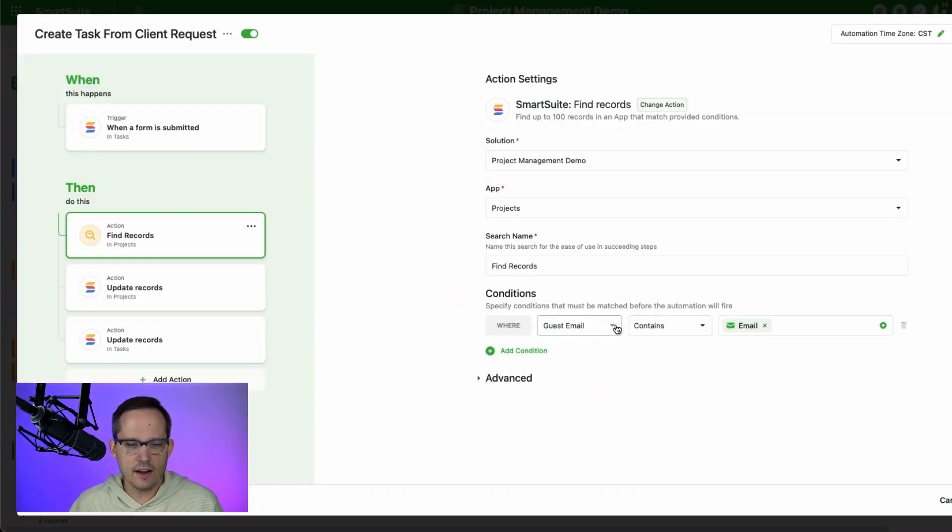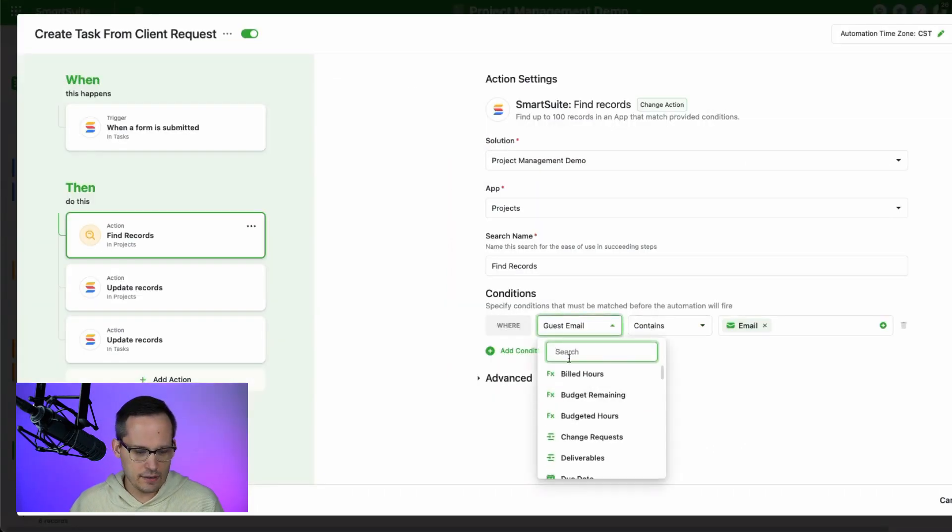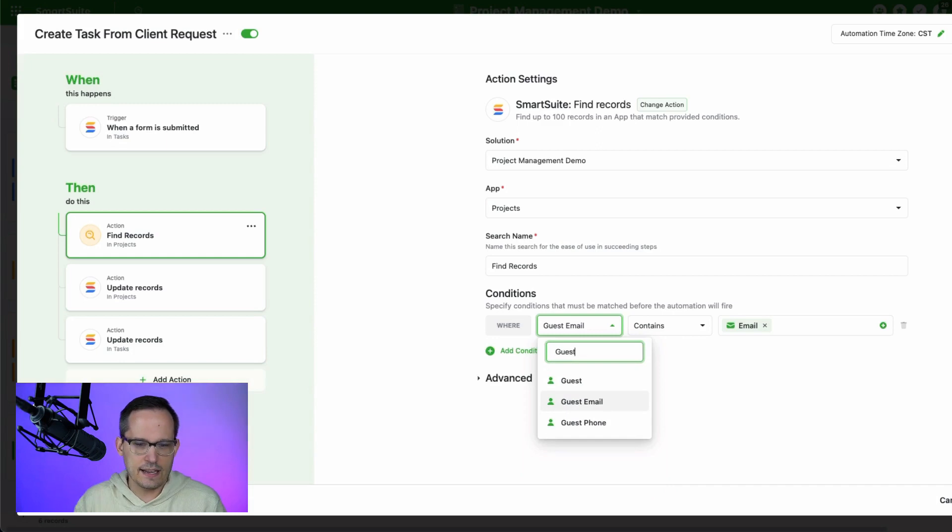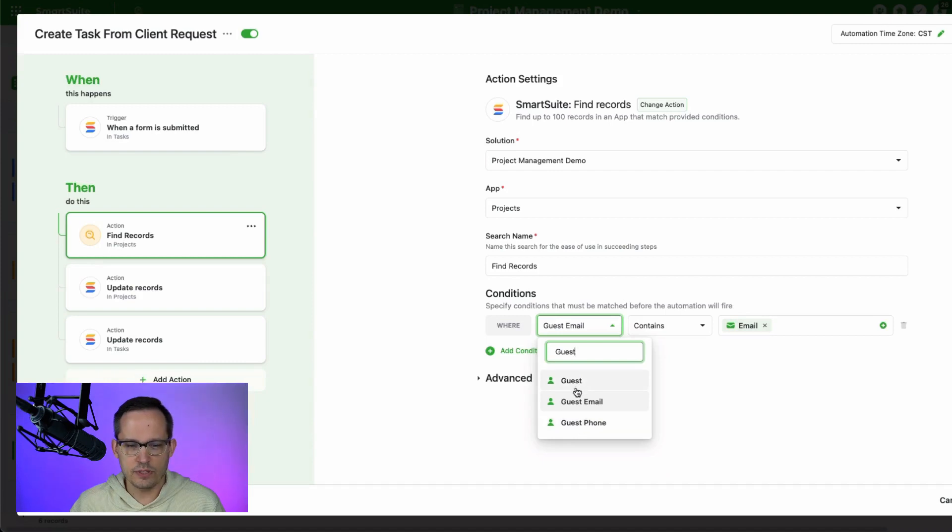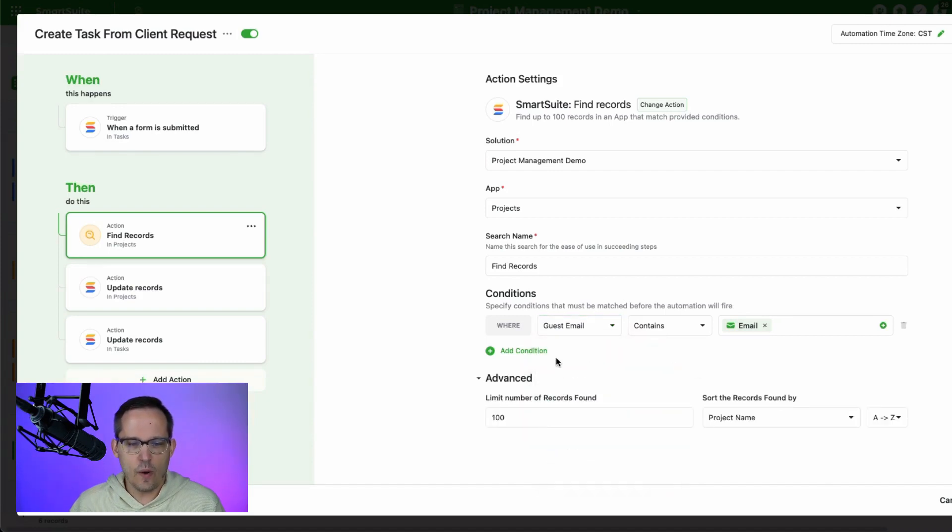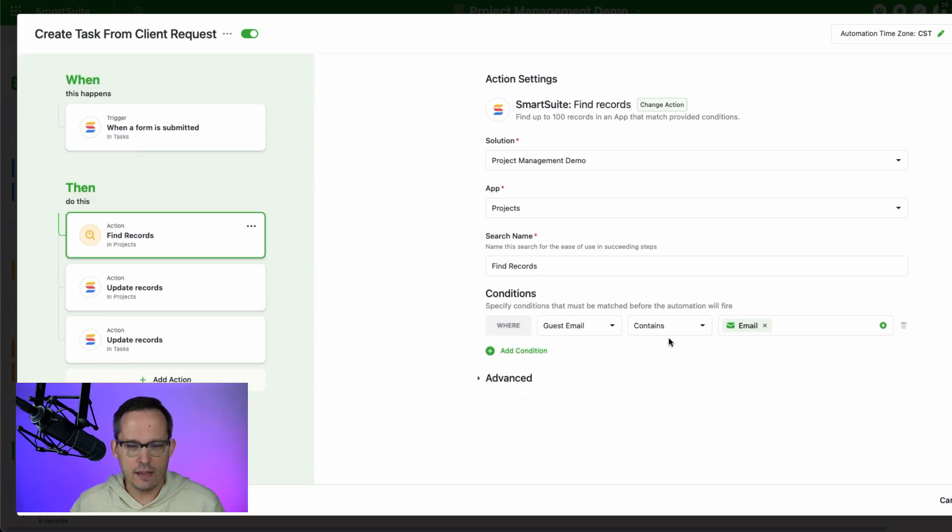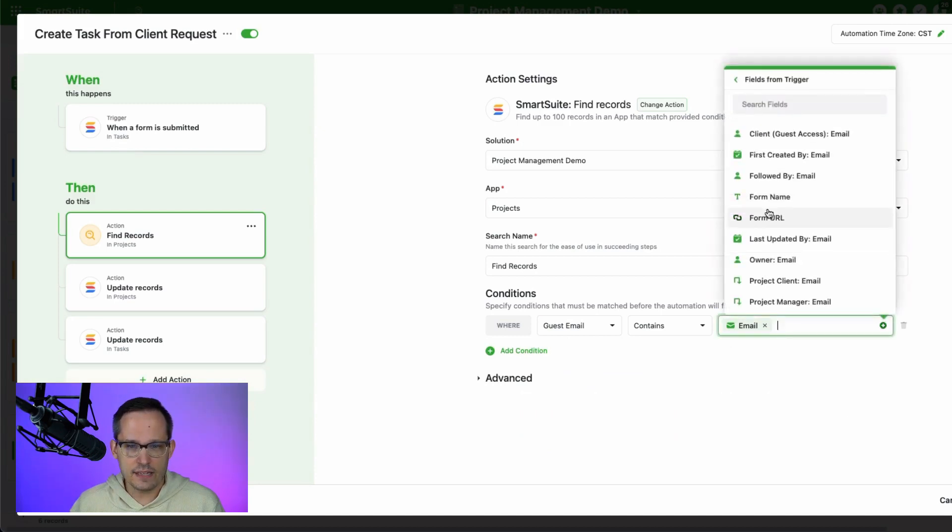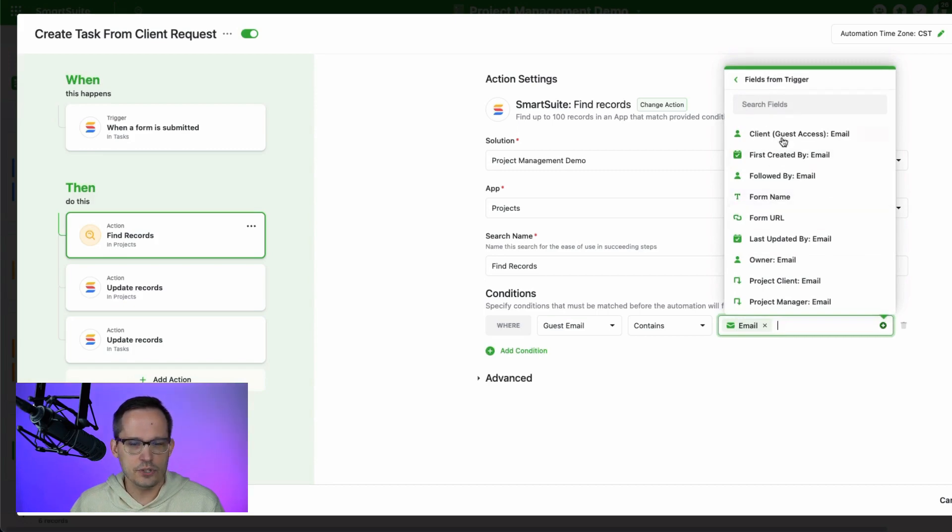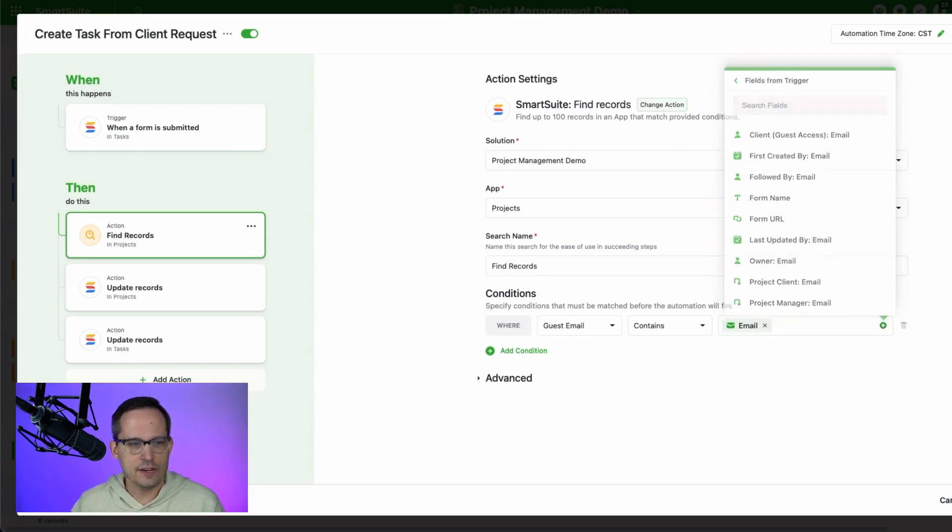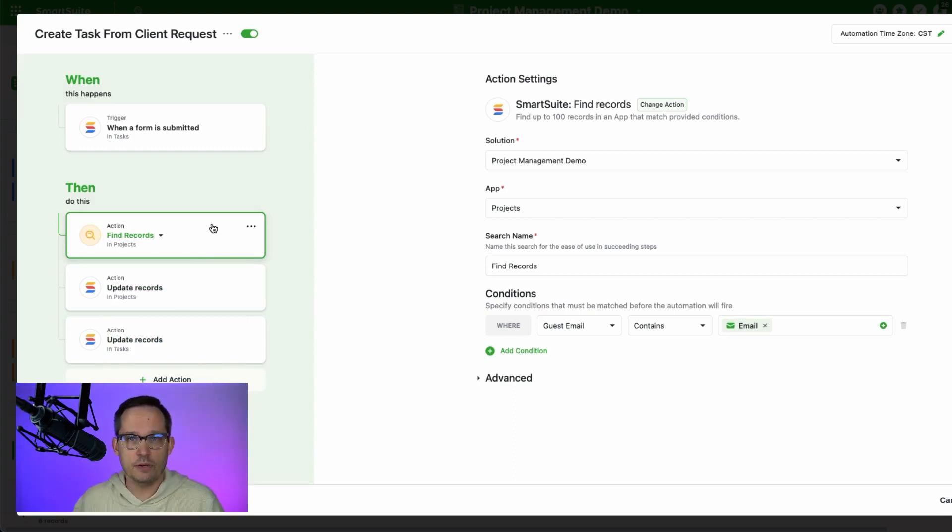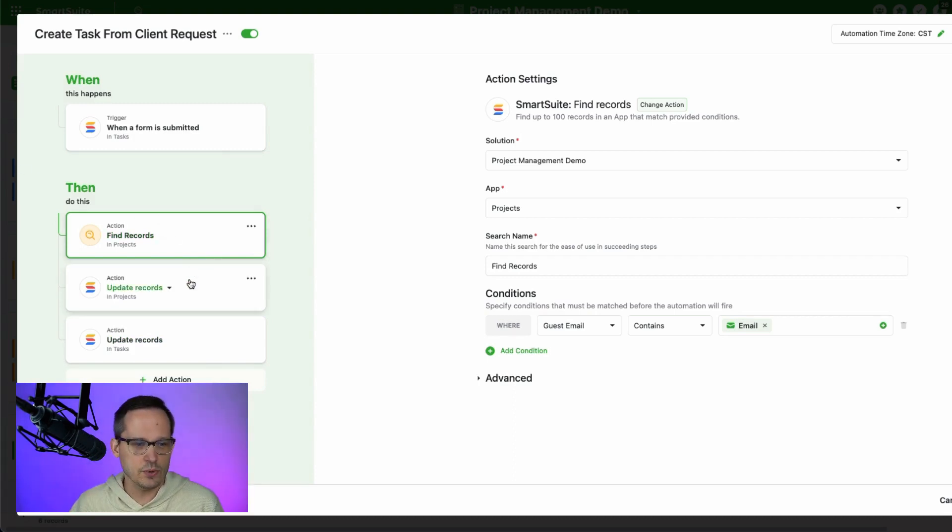And now back here in that automation, that guest email is coming from the fact that I have that guest, or essentially the assignee field, and I've got guest, but it also has guest email and guest phone. So it's really pulling from that guest record. So I'm saying where that guest email contains, then the email address. And that email is coming from the trigger, which is that form submission. So this has all of the fields from that, and I'm pulling that email to check and see if it matches. If it matches, that's going to find the appropriate project record for that individual.